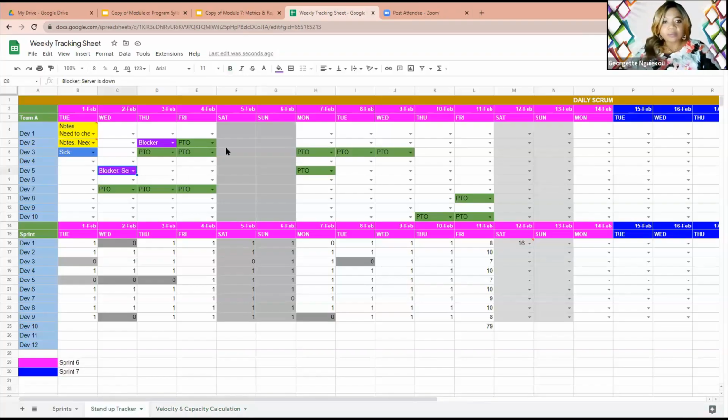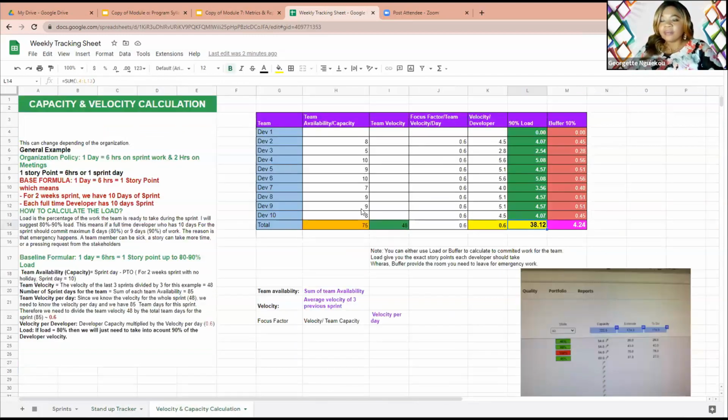So I always recommend having your formula keyed in. Like, for instance, like this, guys, are you planning to be out? Are you planning to be out? Are you planning to be out? When they tell you that they are out, you put their PTO in. Then from this PTO, you come here now and have this list and put them based on this.